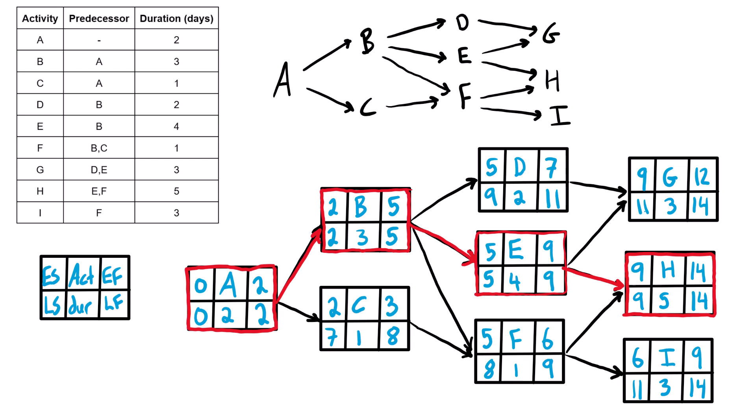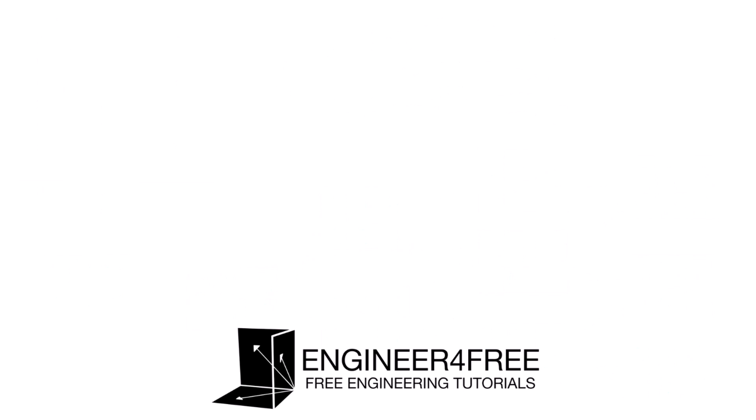The critical path means that if any of those critical activities are delayed by even one day, the entire project will be delayed. The project duration is 14 days. Non-critical activities have what's called float or slack — they can be delayed for some amount without delaying the entire project. I've made videos on float and slack as well. Hopefully that's helpful — I'll put up a link to another video covering another network diagram and critical path problem. Check that one out, and hopefully you have an awesome day.